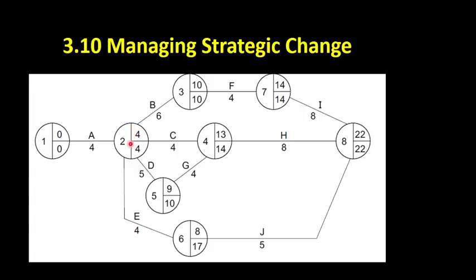So we've got quite a lot of slack time here. If we do 13 minus four — week 13 when we've got to start the activity, minus four when we could possibly start the activity — that gives us our float time. So we've got a potential float time of nine weeks here. There's nine weeks in which, any time between week four and week 13, we could choose to start activity E.